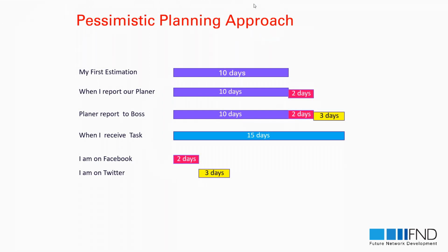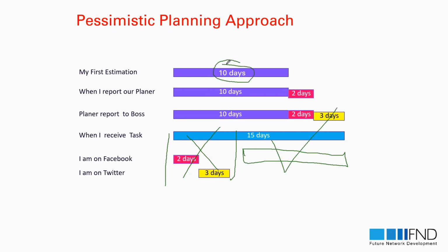So what happened is the 5 days I have used, and I have not started my project, because my belief is that this is a 10 days job, I can do it anyway in 10 days. So in these first 5 days, I have done nothing, or I perform very little with low performance, because I'm not very well motivated, because I believe that the 10 days will be enough for me to complete the work. This is what I believe, because my estimation was the 10 days.